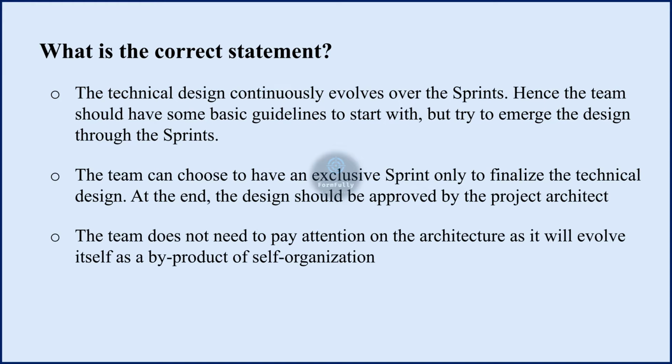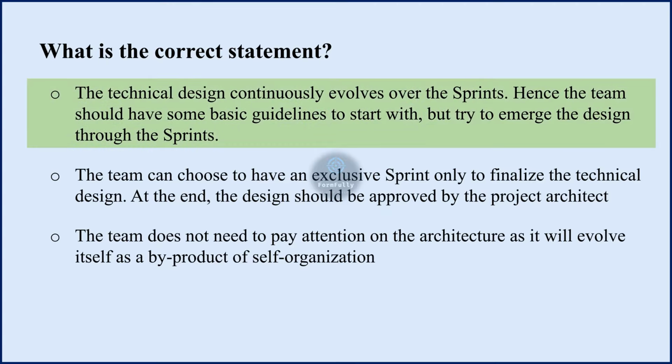Option 3, the team does not need to pay attention to the architecture as it will evolve itself as a byproduct of self-organization. And the correct option is the first option. In Scrum, the approach to technical design is iterative and incremental. While it's beneficial to have some initial guidelines for a high-level architecture, the detailed technical design evolves over time as the development team works through the sprint.